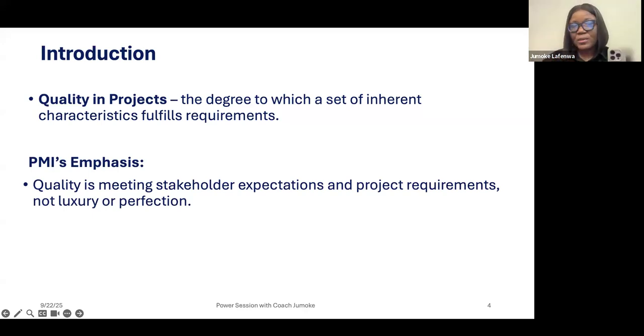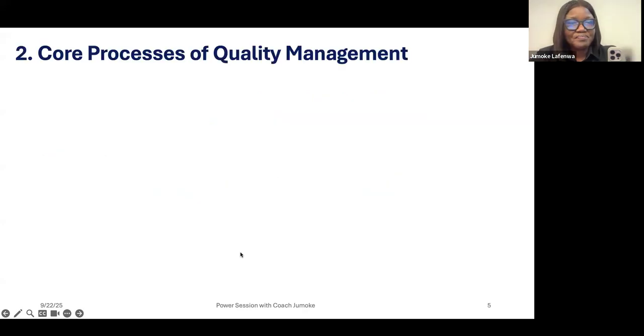These are the people that the project would have impact on positively or negatively. They may want the project or they don't want the project. So you identify these people, and then as much as possible, you collect requirements from them. In identifying them, you'll be able to come up with what we call the communication management plan to know how you'll be relating with them.